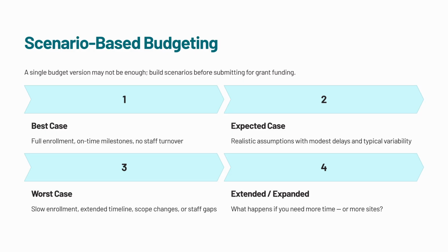This does not mean you submit every scenario to the funder. It means the team understands where the budget is fragile. Scenario-based budgeting helps you see the consequences of uncertainty before the trial is already under pressure.